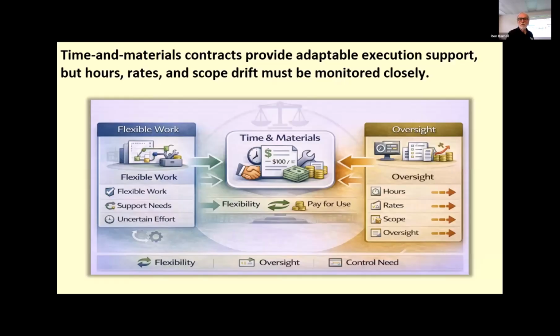They're common when specialized labor, short cycle support, staff augmentation, maintenance work, or incremental technical effort is needed. But the total amount of effort cannot be estimated precisely at the start. So as I was talking about earlier with the adaptive projects, they'll be cost reimbursable. They'll say, our time and materials. We've got 10 people on the team. We're going to pay them 40 hours a week for a year. That's our time. And any materials they need, we'll provide them with computers, whatever it is.